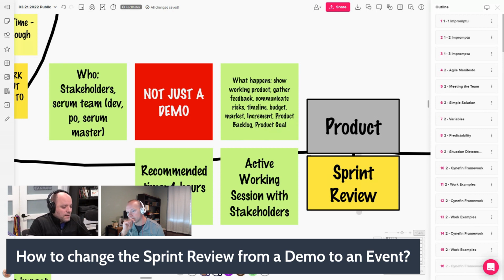In fact, countless teams have moved to basically recording new features on a video and distributing that prior to the review. Because we're not even going to go into it. If you have questions or comments, great. Give us your feedback, but we're not going to waste this precious time going through features when we have so much more to collaborate on so that we can get the best possible product backlog in good shape so that we can start the next sprint with the latest and greatest information, fully aligned with customers and moving in a good direction.